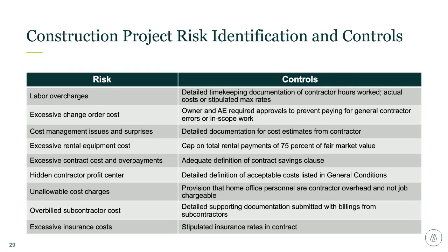For example, labor charges: have detailed timekeeping documentation of all the contractor hours and make sure that it's all well documented. For change orders, you can make sure that you have all the approvals and make sure that there's no errors within the change order cost and that it's all itemized.